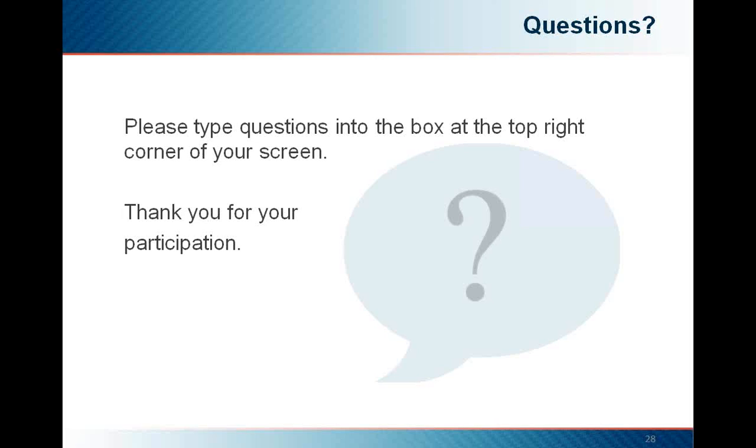Actually, we had a chance here at IntelliDyne one time to use Agile to dive into a project that was having some issues, and so we did have to transfer over to a more agile methodology in flight, so to say. What we were able to find out is that a particular project that might be struggling with issues, or where you may have a lot of unknowns in front of you at this point, really benefits from an agile life cycle simply because you'll be able to take little iterations, little pieces of the application, little pieces of what you're looking for, and deal with those iteratively.